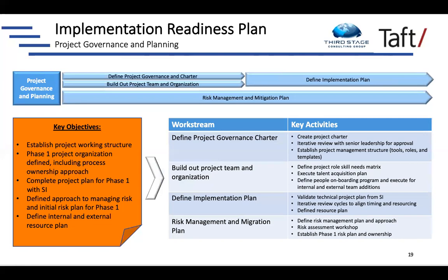So that's the dynamic we're trying to avoid here, making sure that you treat this more as a program management aspect. Your SI is going to provide project management for their work stream, but you as a client need to be providing the overall program management for the transformation. Any questions before we go on to the last few slides here?